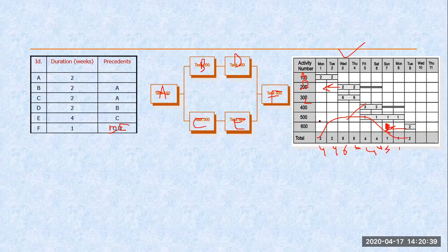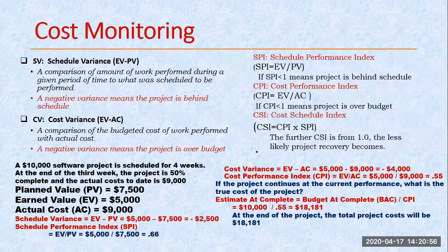Okay, so this is not always possible, that we are always able to arrange in a straight line, but somehow we are going to make something like this. Initially a smaller number of resources is required, then more, then we keep on releasing the resources up till the end. So this is another way how we are going to manage my resources. Clear hai? Yes.